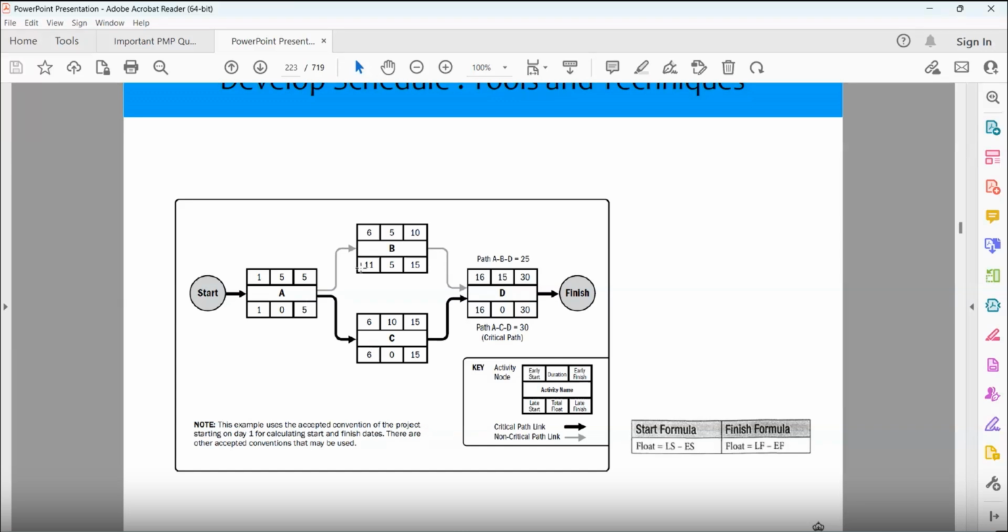When we were going forward, we took the maximum one. When we are going backward, we will take the smaller one. If you think practically about what is actually happening, somebody wants to do the plastering, somebody wants to build the wall. Whichever day comes first, you will start the work that day. So 11 and 6, you have to select 6. 6 minus 1, 5. 5 minus 5, 0. 0 plus 1, 1. Now we find the float. 5 minus 5 becomes 0.